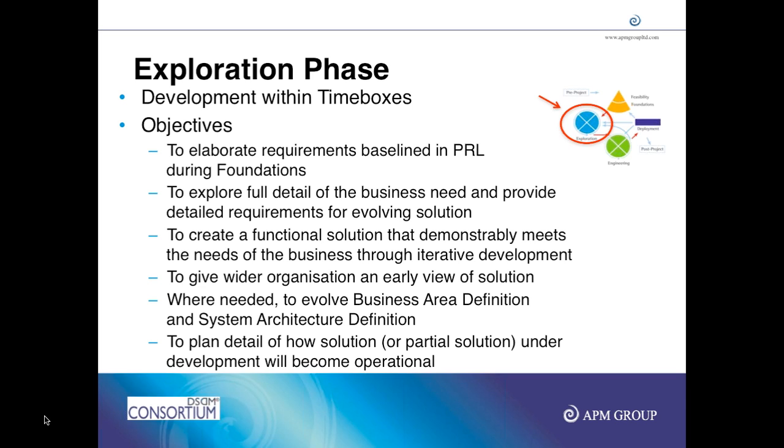Some of them are waterfall style, that is, they happen in sequence, like pre-project, feasibility, and foundation. And then we start the product development, which includes analysis, design, development, testing, reviews. That is actually iterative development. And then once the product is completed, we go through the deployment phase. As part of deployment, we put the product live. And then after the project is over, we do post project to review the benefits of the project.